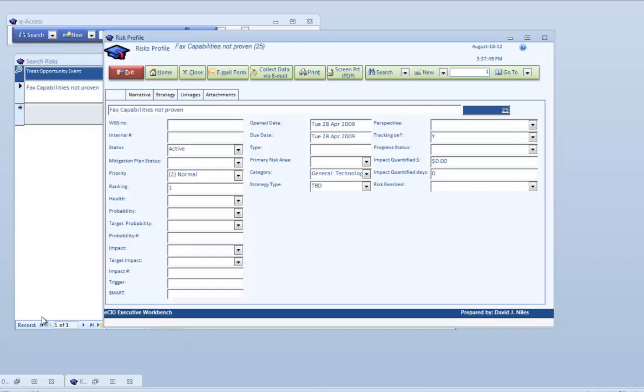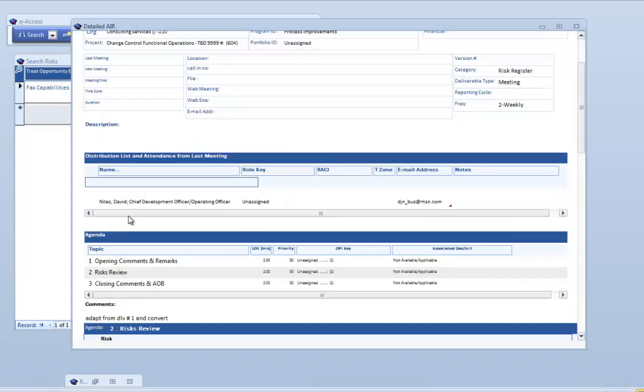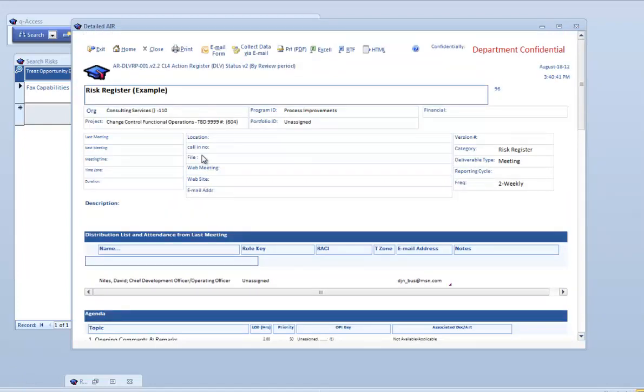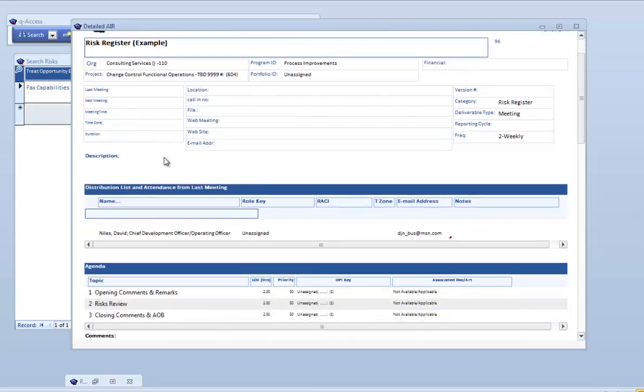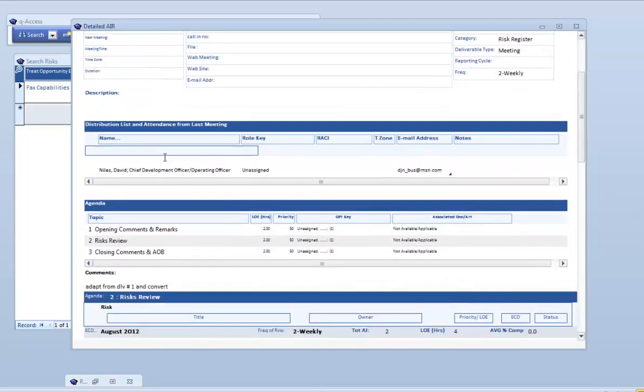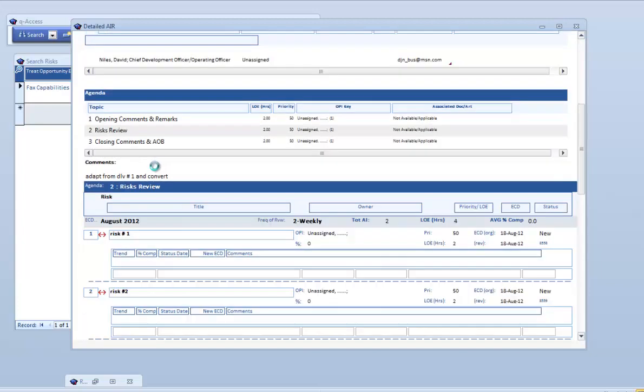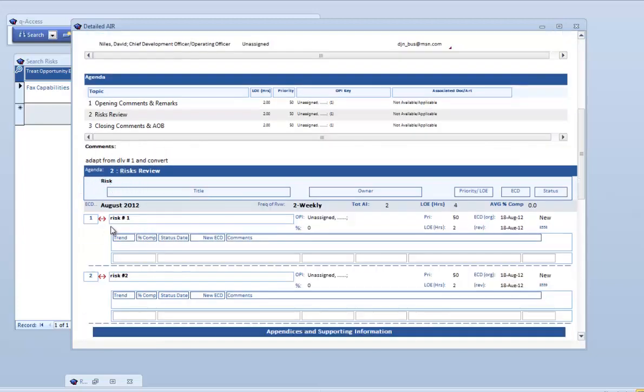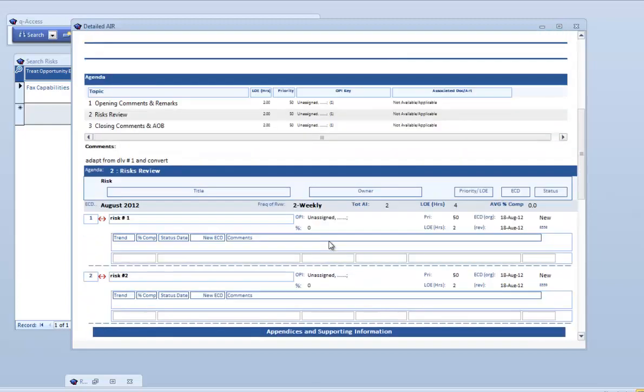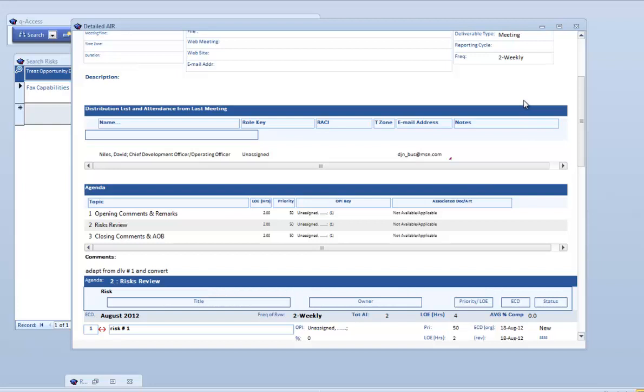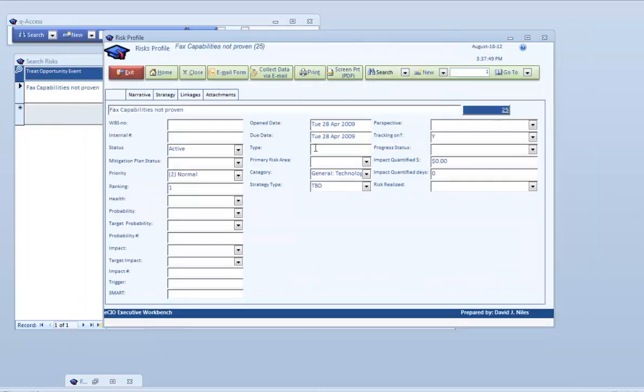There's a separate video on how we do status reports coming out, but just to illustrate, here is a more detailed action item register. We could have our normal status report, and this is tracking specific risks, what the details are, the status, who might own it, any estimated completion dates. It's another more simplistic way of doing it. You don't get into the mitigation, you're just getting into what we need to do to tackle that particular risk.